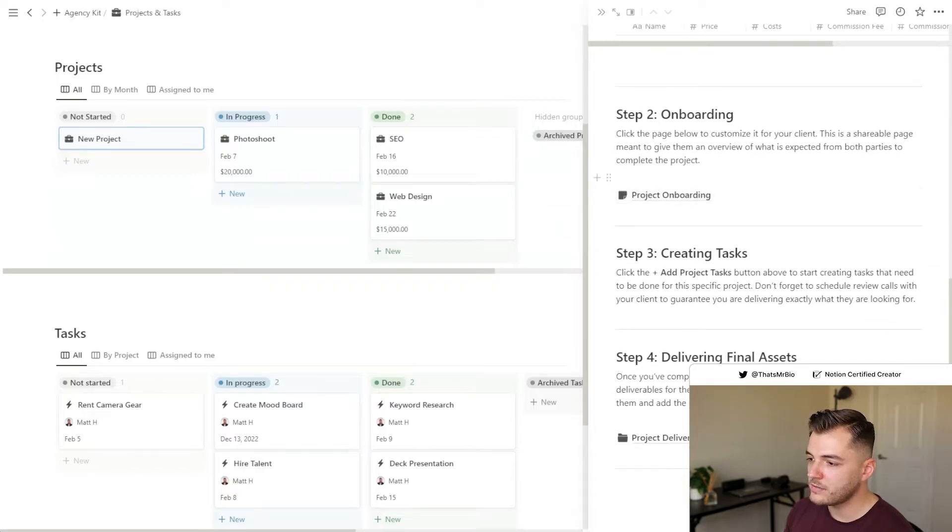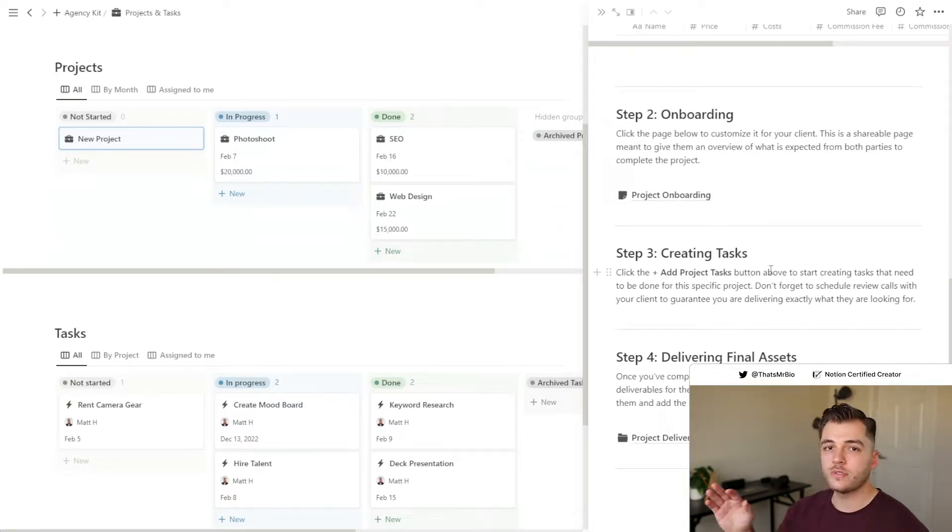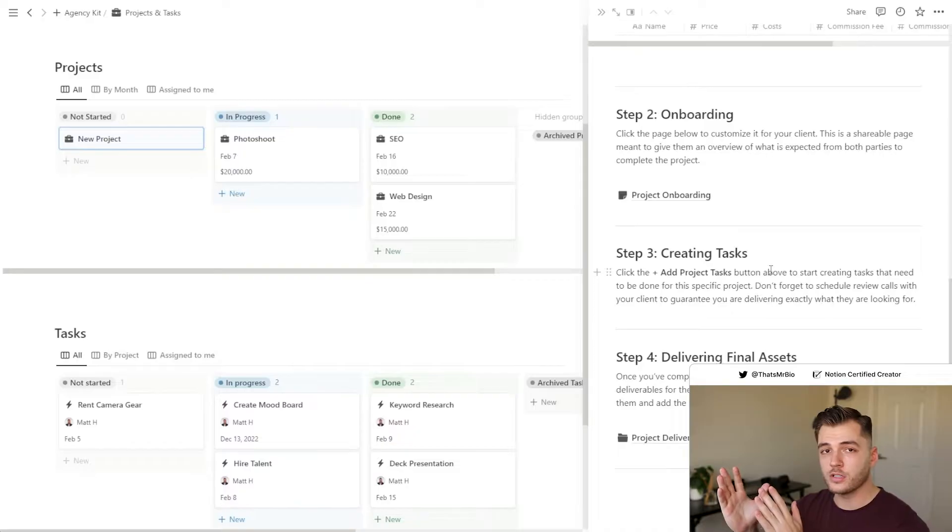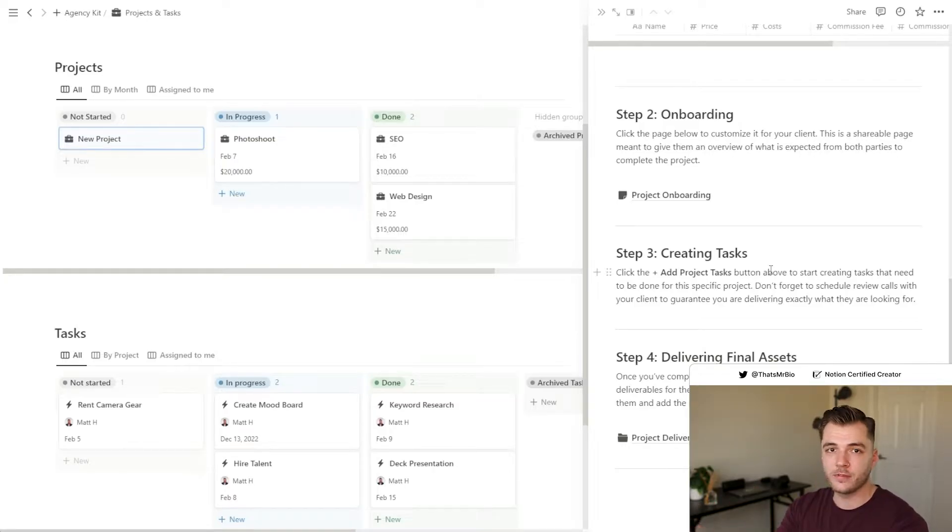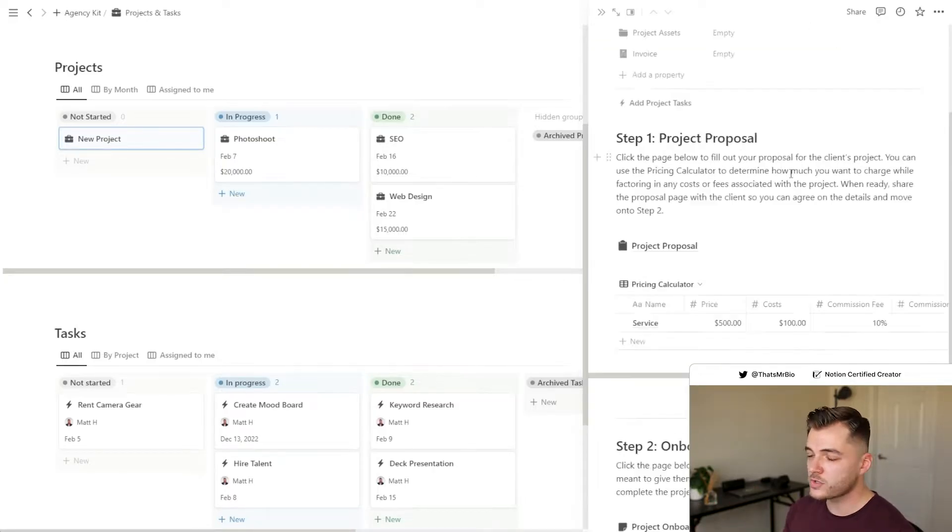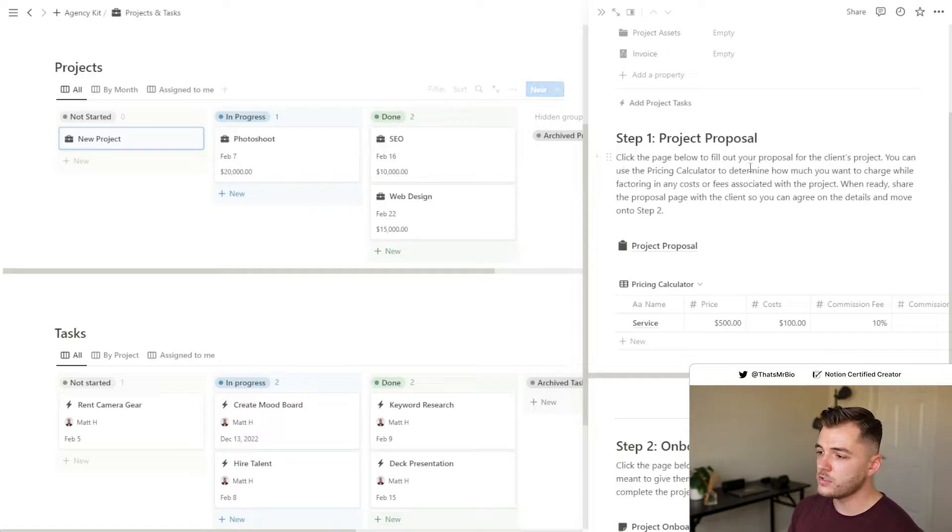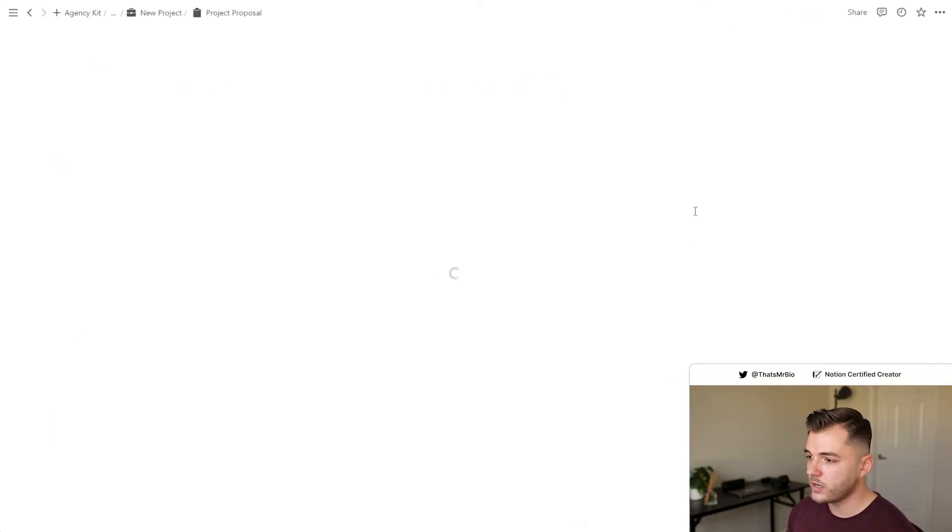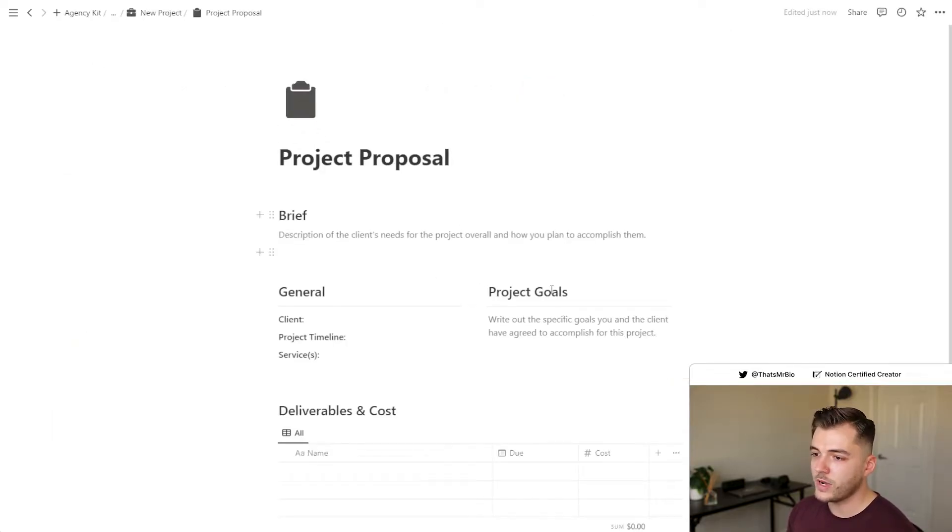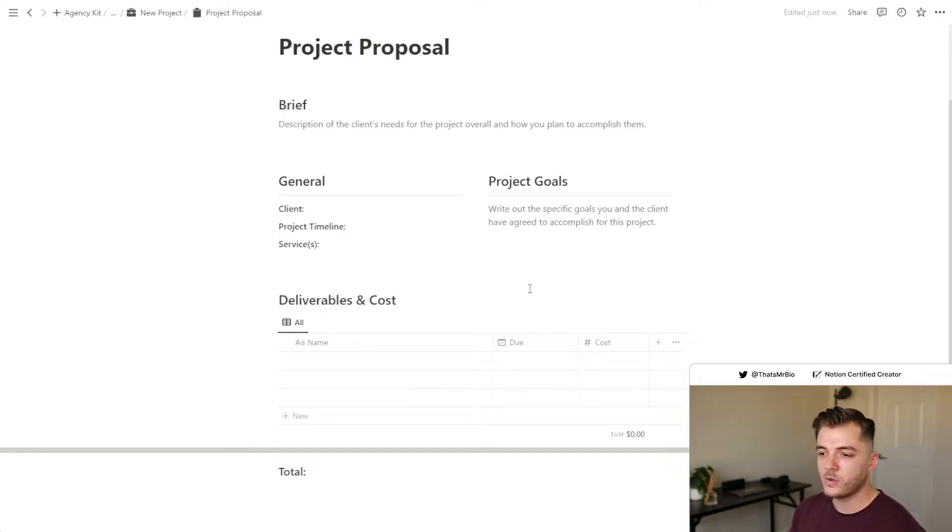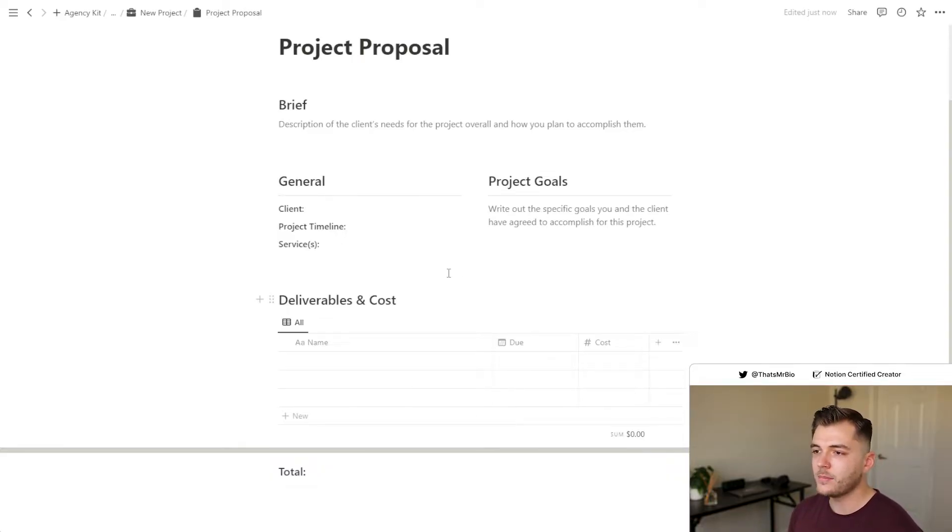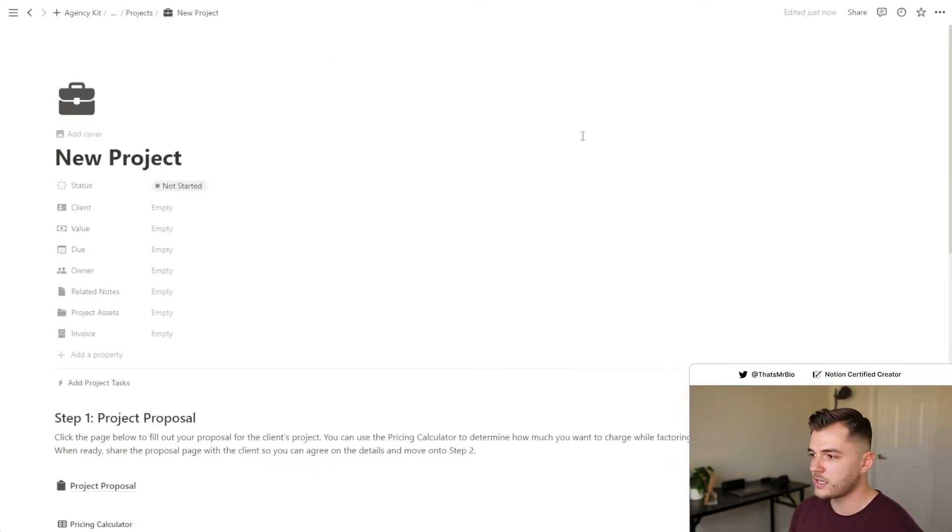From here, you will see a four-step process that you can use to take the project from onboarding your client all the way to closing out everything and delivering them the final assets. So really all that you need to do is start at step one. This will give you a templated project proposal that you can send to the client that will outline all the deliverables, the costs, as well as the timeline associated with their specific project.